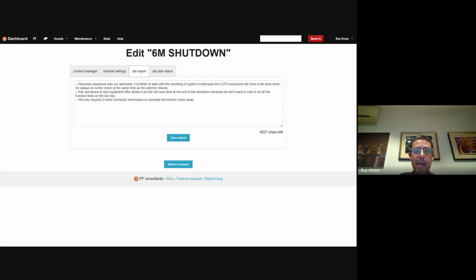So it's this type of thing. Sometimes when you're planning stuff like this, you may save some time by not doing things twice, because one job depends on the same conditions of another job. Most of the time you can tell that, but sometimes you can't. And all these things become apparent at the end of a shutdown. This is where you make a note, so that when you're planning it for the next time, you come here and you remember this and you plan accordingly so that this doesn't happen.